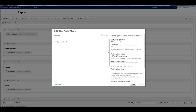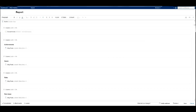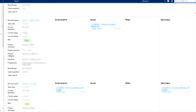In each remaining column, insert a blog posts macro and restrict the labels in the macro to the project label and one of the workflow labels — achievement, issue, and so on. Use a plus sign before the label to make it obligatory. Copy and paste this section below and change the links and labels to fit the next project. Repeat until each project has a section on this page.